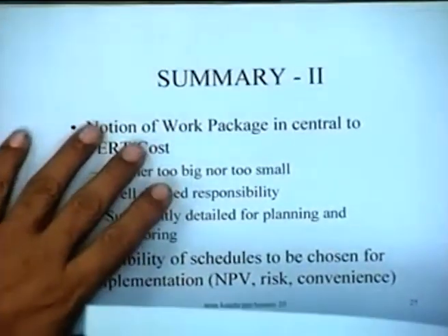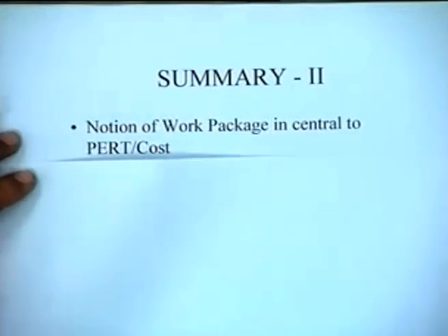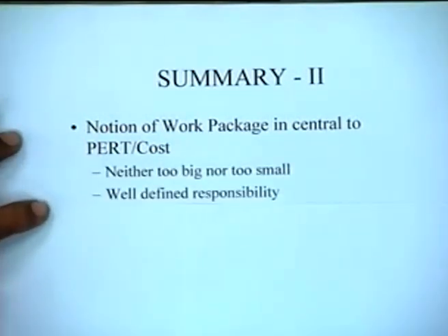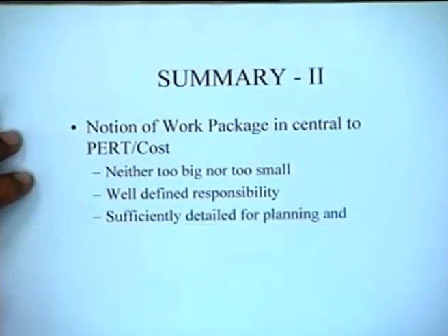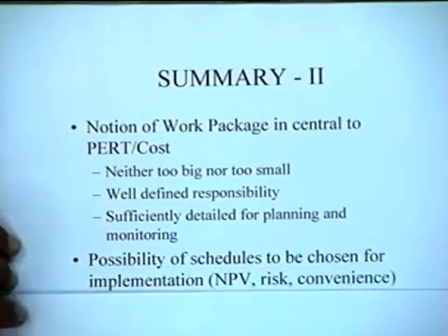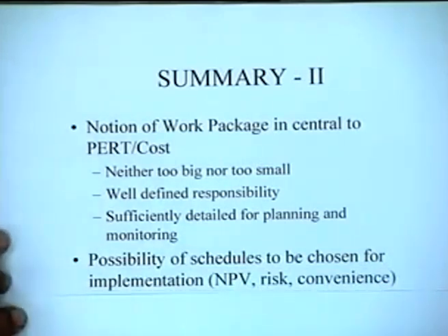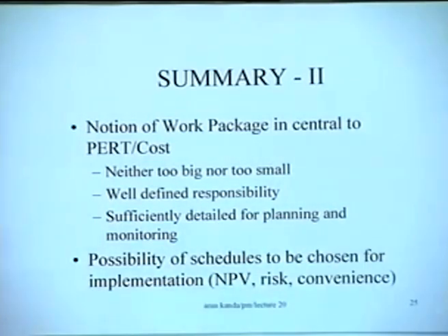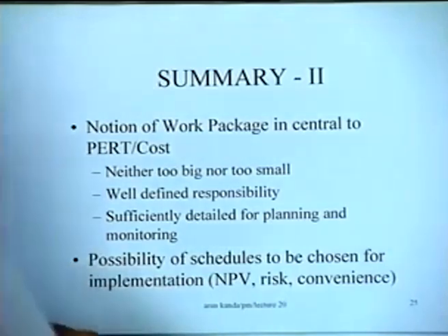The notion of the work package is central to PERT cost. Neither too big nor too small, well-defined responsibility, sufficiently detailed for planning and monitoring, and the possibility of schedules to be chosen for implementation. There is a large possibility of which schedule you choose. It has to be a trade-off between the net present worth, the risk and the convenience that you take, whether you take an early start schedule or a late start schedule or whatever.